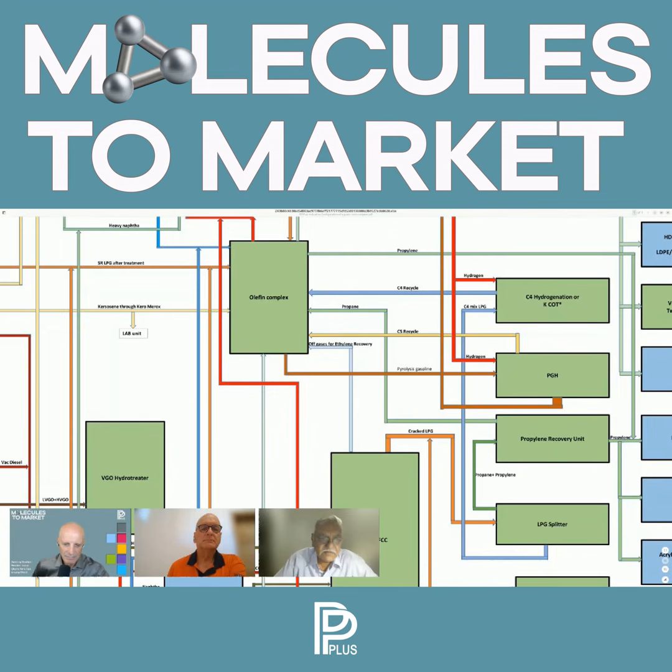In the process of licensor selection, yes, we will go through the NPV route, but while doing so, there is a lot of vital information available with us because we do a lot of the basic engineering, which helps us improve our estimates dramatically. So in our DFRs, we are able to get a plus minus 10% level of estimate without doing FEED.